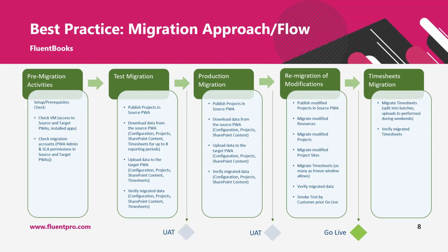Because if there are several years of timesheets to be migrated, it's a time-consuming operation, and usually during test migration, it is not that necessary because data and environment issues can be caught during migrating of those 8 time reporting periods.